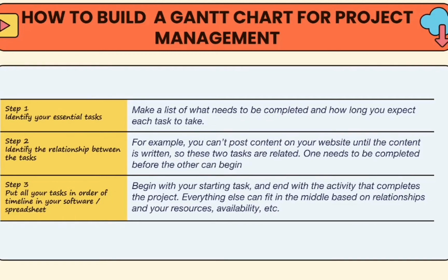Second step, you need to identify the relationship between the tasks. For example, you cannot post content on your website until the content is written. So these two tasks are related. It means that one needs to be completed before the other can begin.